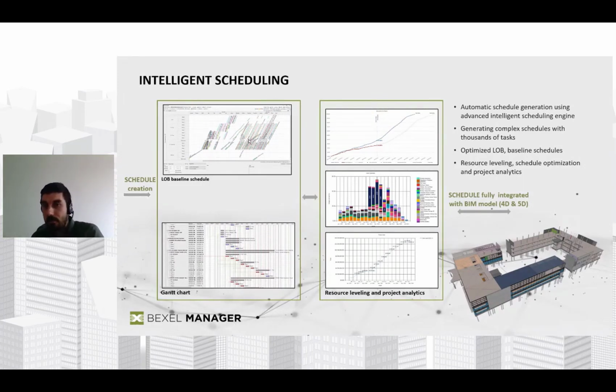I'm not going to be enough. I'm not going to have available resources for this, and then I'm going to be at risk. So I can just go and very easily stretch these tasks to make this schedule more realistic and more viable. And also right away, since everything is fully integrated with your BIM model through the cost classification, you have right away the construction simulation available. So you can check that as well.